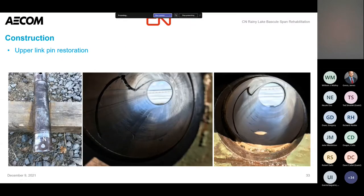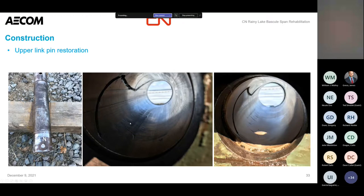They were also working on the upper link pins kind of concurrently with the lower to stay on schedule. These upper pins were four-inch diameter steel pins. We prescribed new pins but maintaining the existing bronze bushings. The middle photo shows once they pulled the pin out and cleaned it — you can see some scoring in there. The photo on the right is the same bronze bushing that they've refinished the surface of by honing — cleaned it up, cleaned the grease grooves out, made sure it was getting proper lubrication. Then they measured and turned new pins at an appropriate diameter to make sure they had good clearance.